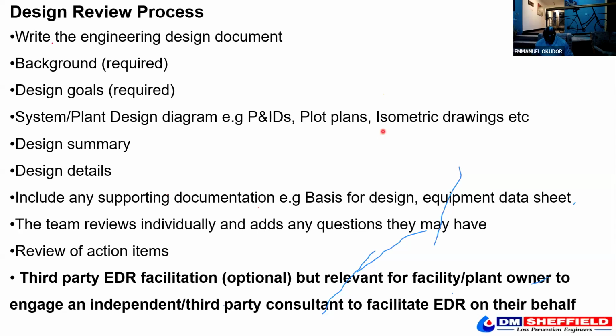I'm going to share something with you on our mine plan where we did the engineering design review. The guys in the US apologized at the point when we critiqued it. Unfortunately, we were combining it with hazard analysis, which is not supposed to be. And like I said, the lowlight of combining engineering design review with PHA, which could be HAZOP, failure mode and effects analysis, fault tree analysis, or inventory analysis, is always the fact that so many things will be left unattended because of timing. Okay, so these are the lowlights.